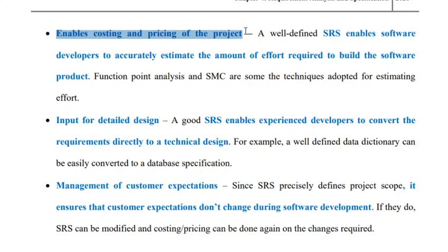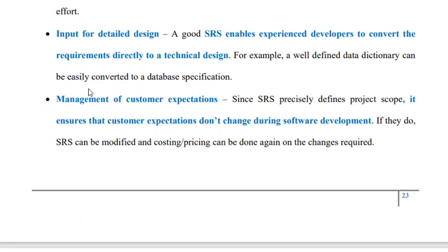These metrics may be used as the basis for determining size, and by using the various standard models for estimating effort and time, we can estimate the effort required and the time required. So from the SRS document, we can identify the functional size, and from the functional size, we can estimate the effort required and the time required for developing the product.